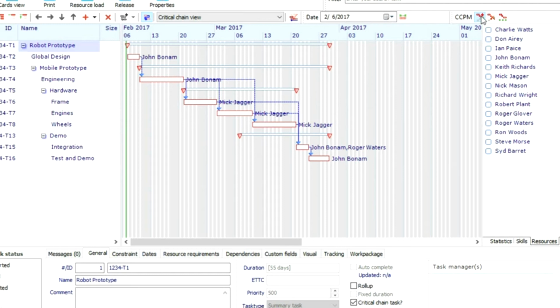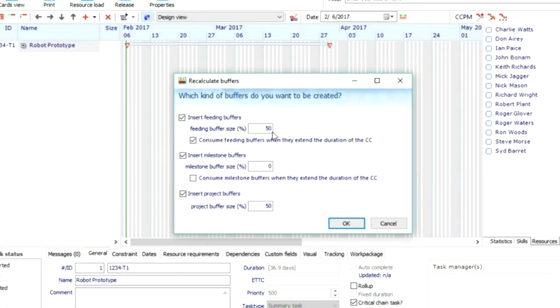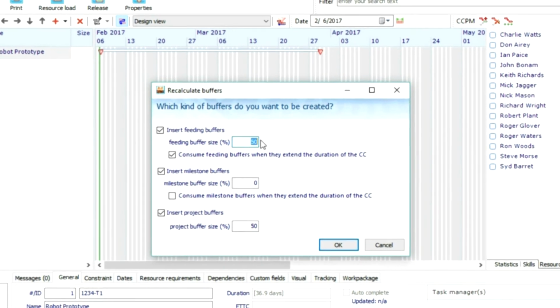Although some tasks might still be in time, most tasks won't. This aggressive schedule isn't realistic anymore. So now we add all the reserves that we took and we add it to the end of the project and put it in the project buffer.